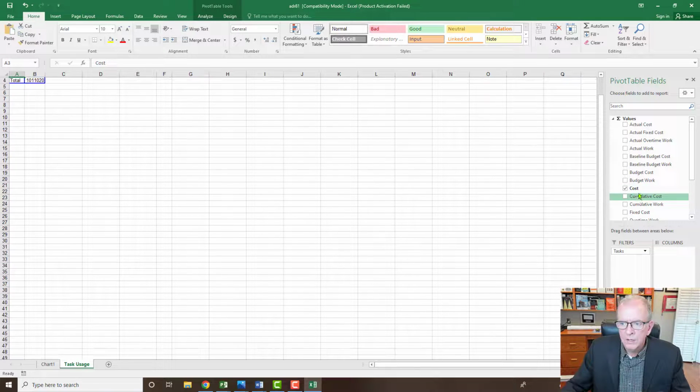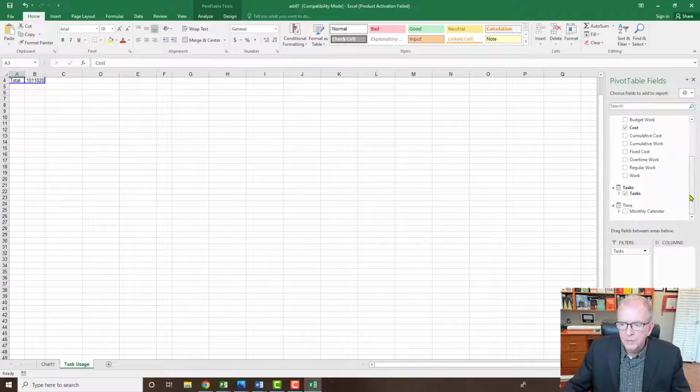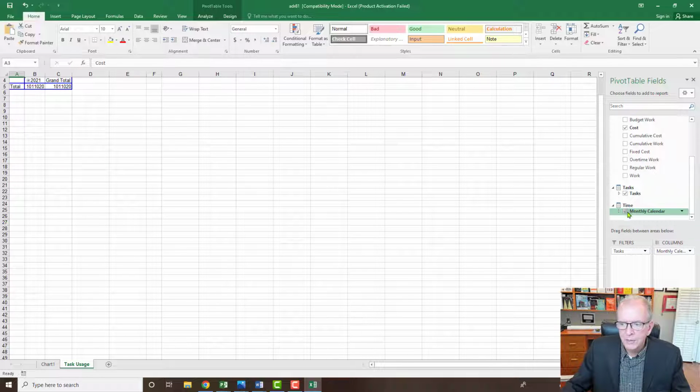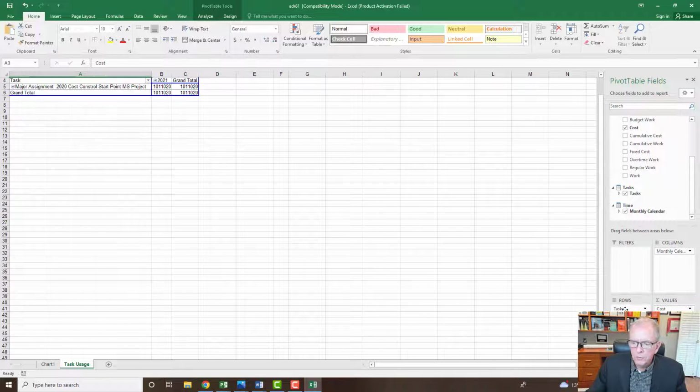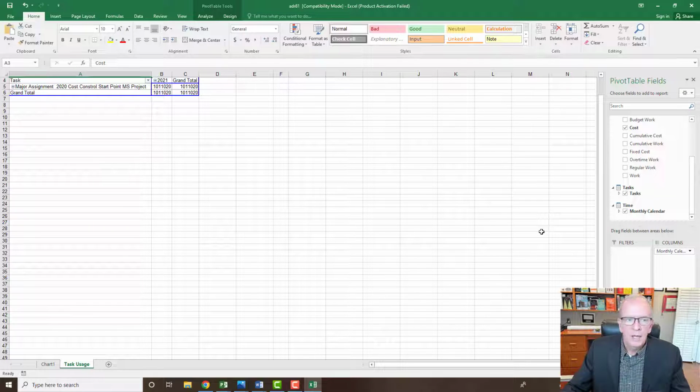All right, so I've gone to cost, and you'll have to scroll down here to the bottom and under time, pick monthly calendar. Right? The data's in here, but now you're trying to get it to show what you want to show. So you've got monthly calendar, and where it says filters and tasks, I'm going to move it over to tasks. I just grab it and I'm going to move it over to rows. Okay, so now I've got that information in here, and I've got it moved to rows. I've selected the monthly calendar, and I've deselected the actual cumulative cost.